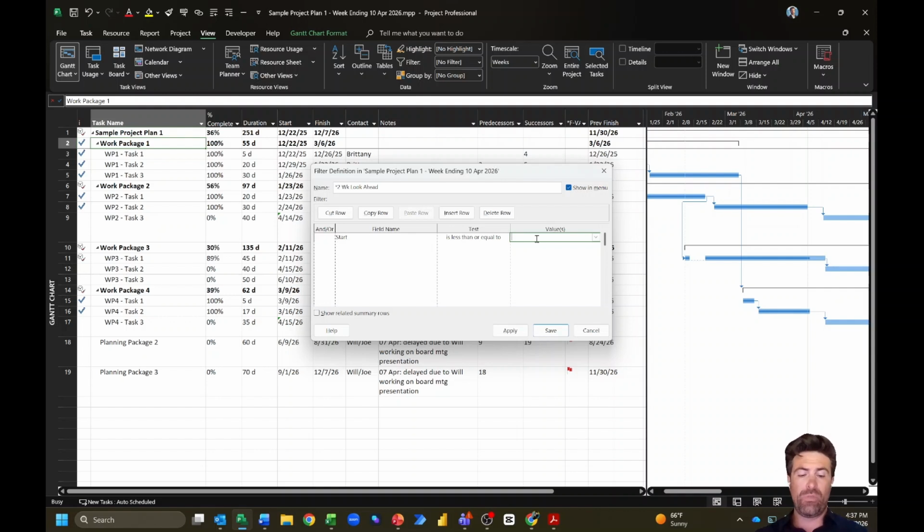I don't think a lot of people know this, but you can actually use Microsoft Project to prompt users to provide input. What I like to do is put in quotations here, "2 weeks from today?" The quotations combined with the question mark is what triggers this functionality in Microsoft Project to prompt a user to provide input. You'll see why I did that in a few moments.